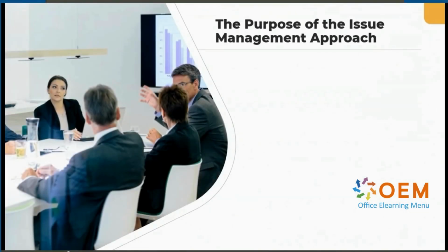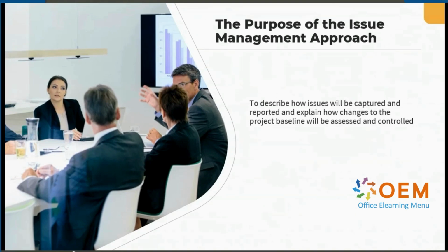First up, the issue management approach. The purpose of the issue management approach is to describe how issues will be captured and reported, and explain how changes to the project baseline will be assessed and controlled.